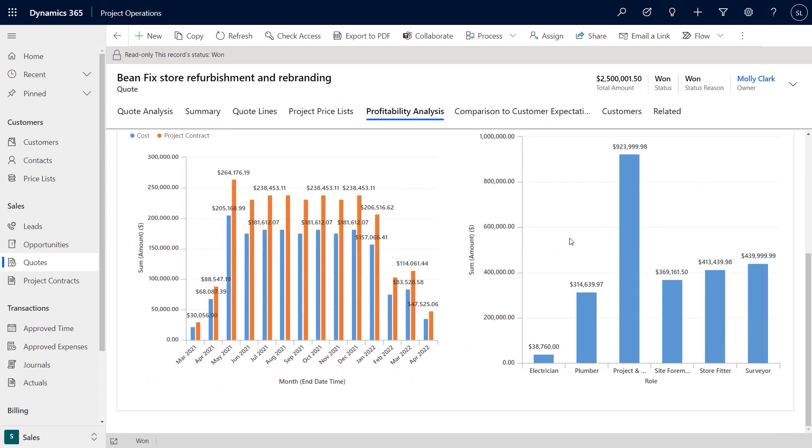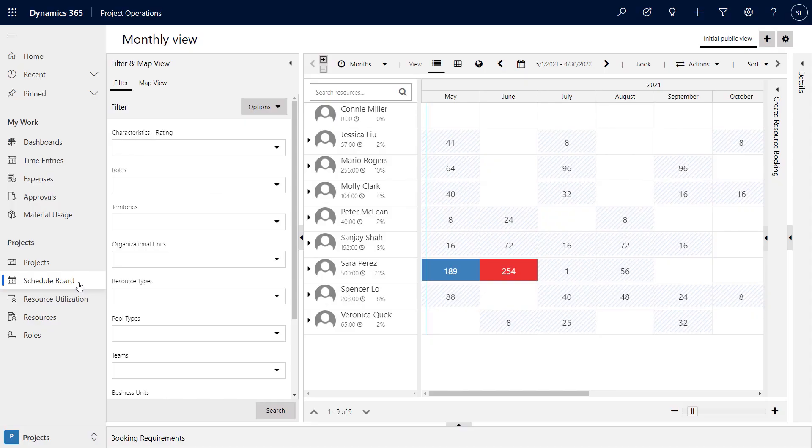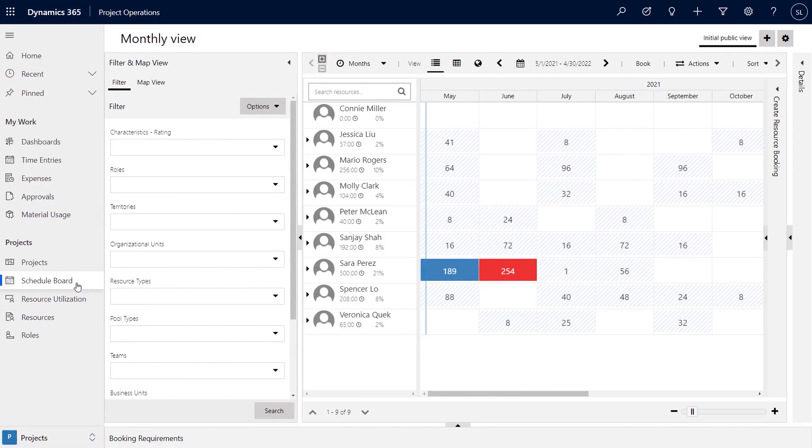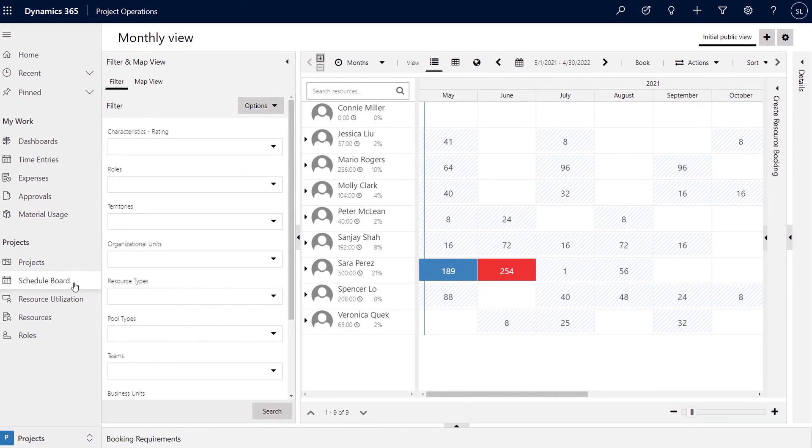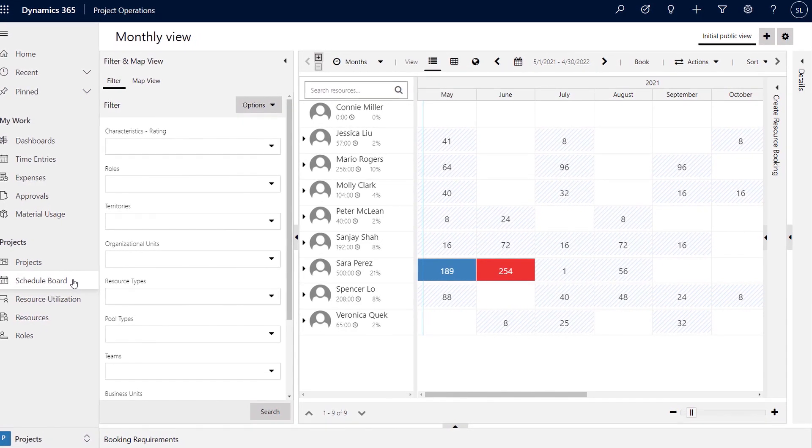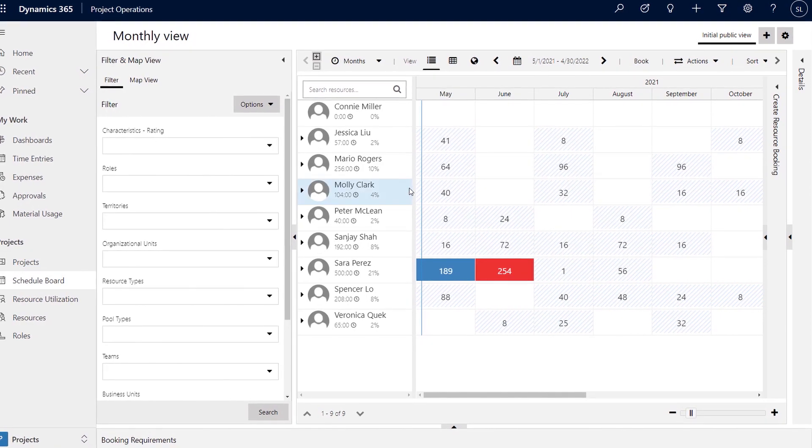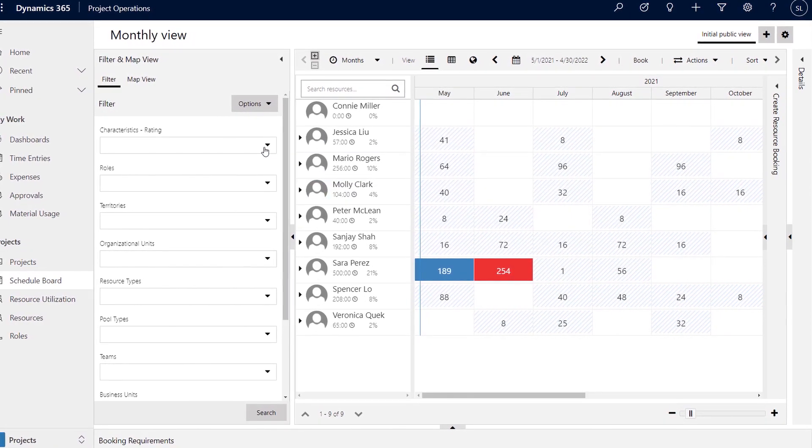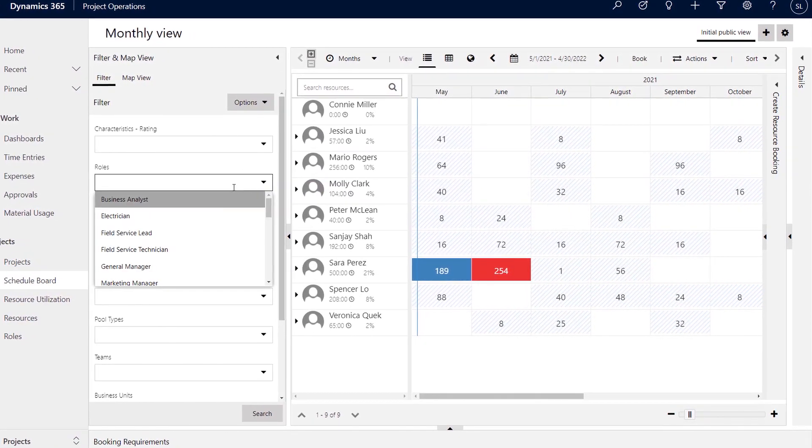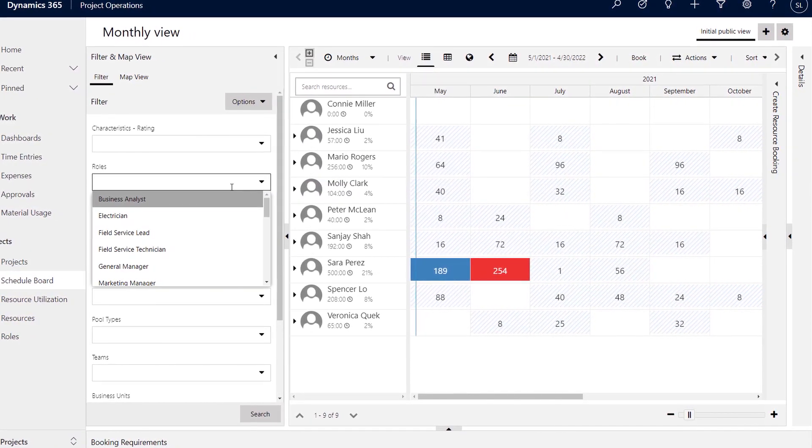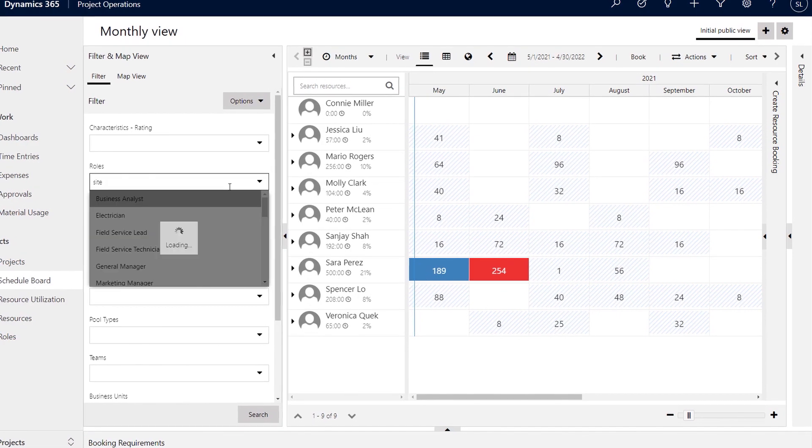Once you're ready to move forward with the project, how does Project Operations help you assign the resources to carry out your planning? Well, project leads can now use the schedule board to easily see who is active on other projects and if people with the needed skill sets have available time to staff the new project.